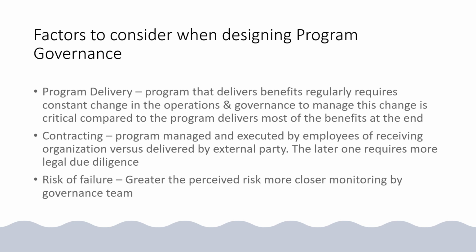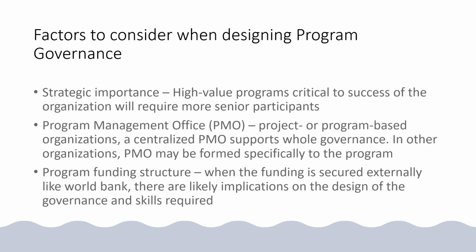The final one is the risk of failure, right? When there is a greater perceived risk, more close monitoring is required by the governance team. So you have to put more oversight and more reviews inside your governance plan. A few other factors to consider while designing the program governance is strategic importance, right? High value programs critical to the success of the organization will require more senior participants, more reviews, and closer monitoring.